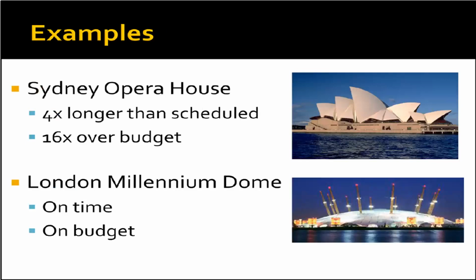Additionally, those in charge of the estimation of visitors were considered to be unrealistic in their initial projections and did not revise estimates as data became available once the dome was open to the public. This caused the operation of the dome to run into significant financial difficulties early on. Unlike the Sydney Opera House, the Millennium Dome did not have the impact expected. It did not meet the expectations for success by its customers.